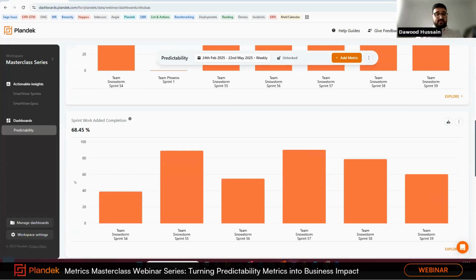And this is critical because mid-sprint additions often come from unplanned stakeholder requests or incident responses, or a bit of ambiguous backlog grooming. But constantly adding large amounts of work can disrupt that team focus. And if that work doesn't get completed, it leads to more rollover and more rework. And it comes back to the point of cannibalizing your time and your effort to actually deliver new value in the upcoming sprints. And so by tracking this metric, you as team leads can actually establish strong controls on scope creep. You can better handle the urgent work that comes in without jeopardizing some of your sprint goals.